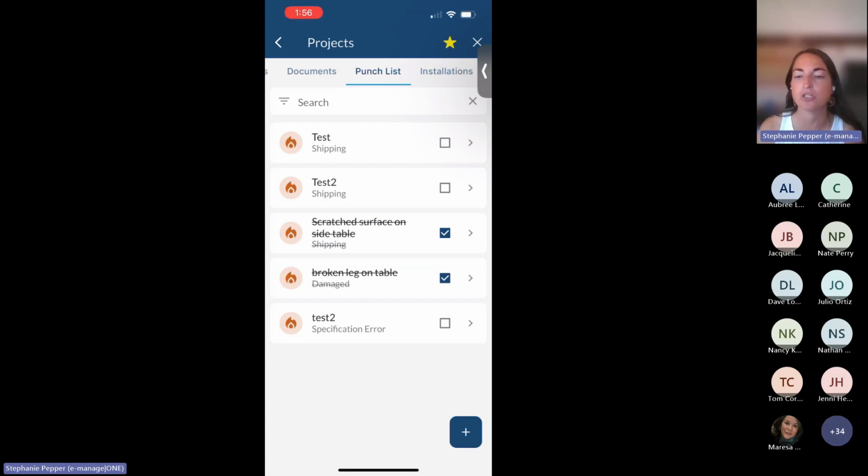You might still submit some action items, but typically salespeople want to see what they have out there open on their behalf, for someone to actually complete. Open actions are just FYIs. You can't complete open actions. So when someone completes them from their actions to perform queue, then it'll come out of your open actions automatically. But the action item physically has to be completed, as well as ticking the punch list item as closed or checked off as completed. Catherine, hopefully that helps.